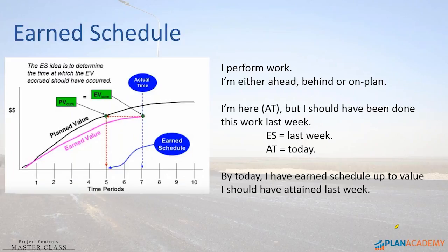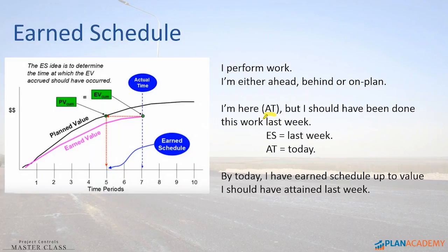AT — you're going to see AT used a lot — that's Actual Time. Basically think of it like your data date. Here's my status date. When I look at my baseline, I should have accomplished the stuff I'm doing right now — like this week — I should have accomplished it last week. So basically, my Earned Schedule says: Earned Schedule at this moment is last week's work. Today, I've only earned up to where I should have been last week. By today, I've earned schedule up to the value I should have attained last week.